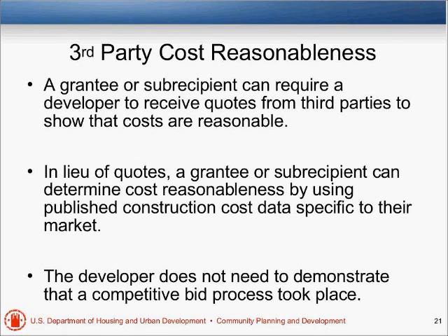This is often a kind of market where you are and what they are doing. For single-family units, I traditionally see developer fees ranging in the 8 to 12% range, with 10% being fairly common for single-family development. For multifamily development, again, you have to base it on what they're doing, what their scope of work is, how much work they're having to do, how much risk they're taking.